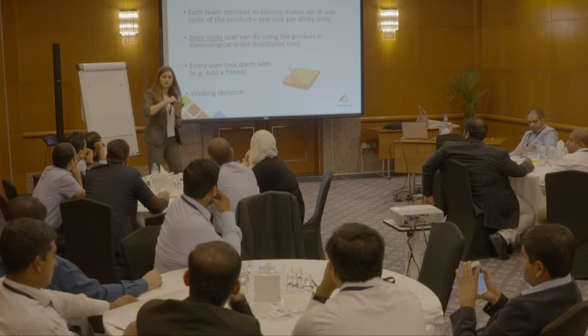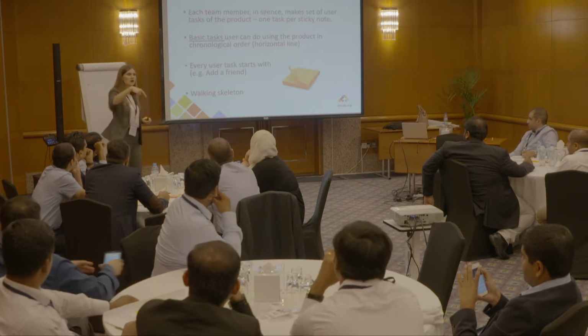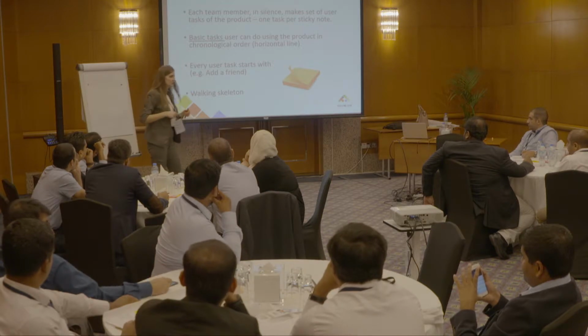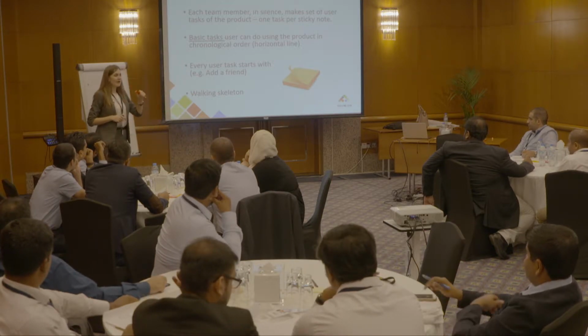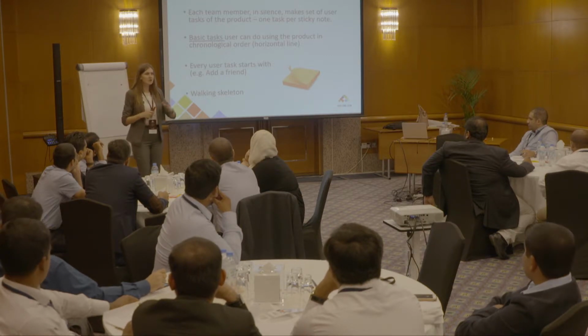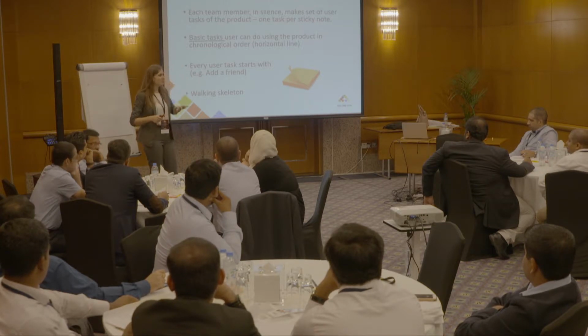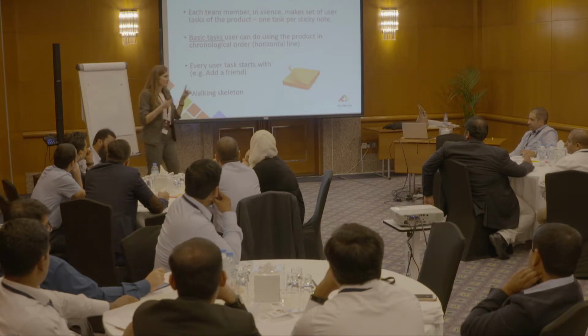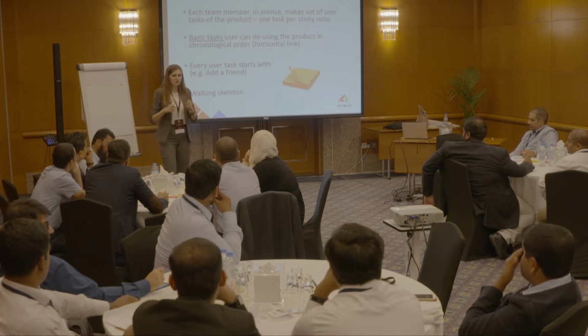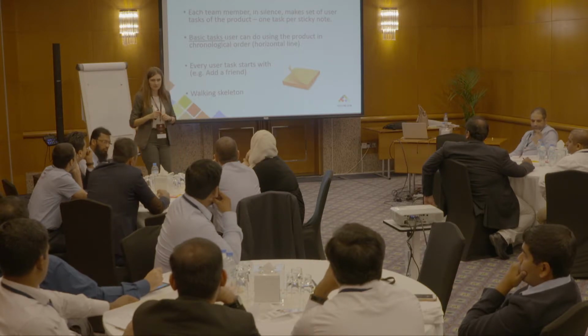So later we will be placing this. It's going to be one task per one sticky note, and I already delivered some sticky notes that you can use. And this step is being performed silently, as individuals, not as a team. What's the purpose? When we're working as a team, we hear friends' ideas and we adopt them. When working as individuals, we share our own ideas, and we collect more ideas that way for later when working as a team.